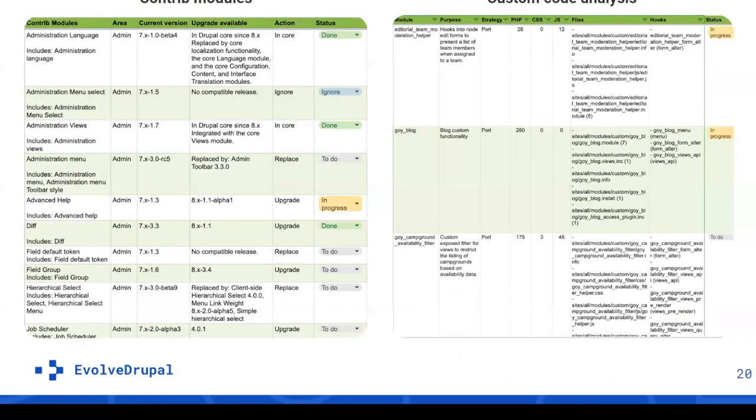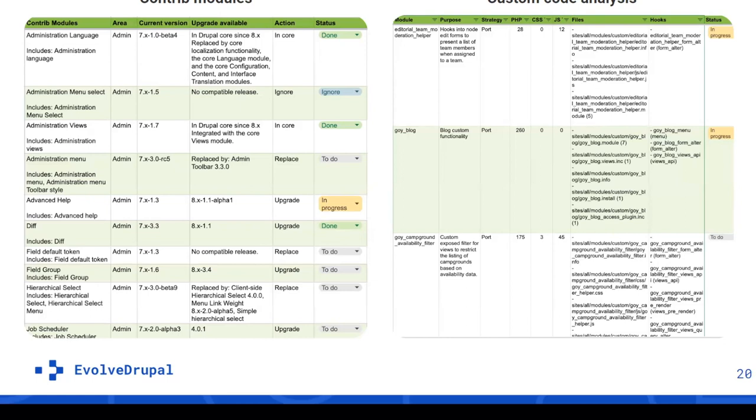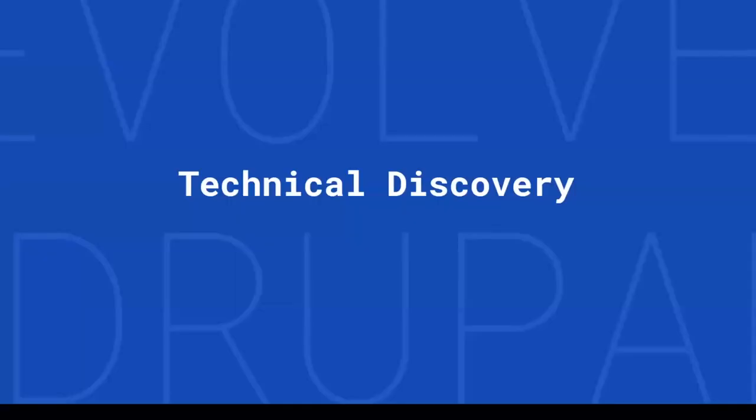For Yukon government, we did the hardest one - Drupal 7 to Drupal 10 migration. Based on our experience, we understood documentation plays a huge role especially in the beginning. Proper assessment and thorough discovery makes development and testing well set up and clear for every team member. Documentation includes thorough analysis of content types, taxonomies, theming, views, and modules, plus clear plan of each bucket of work, their statuses and milestones. Here's Contrib modules and custom code analysis with their upgrade availability, actions, and statuses.